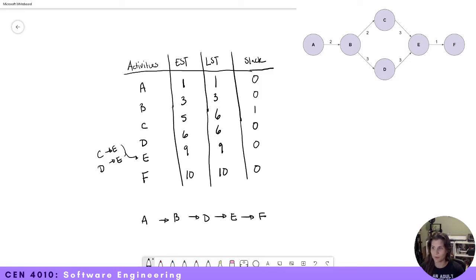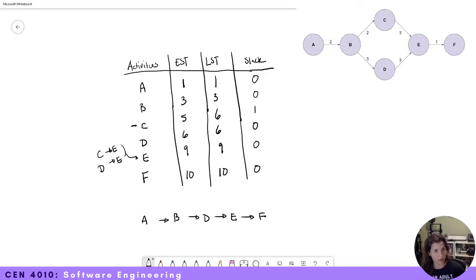That's because we have slack on C, meaning C is not on the critical path. So there you go — this was a short tutorial for calculating earliest start date, latest start date, and slack on an activity graph.